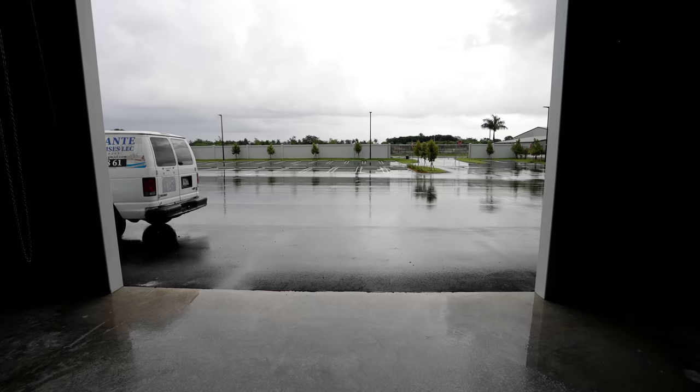Okay, how long will this be in the mold? We have boats in the molds 4 to 6 weeks. Really, why so long? Part of it is that we ensure the curing process. As the guys are hand laying the layers, we want them to dry, we want them to cure properly. Secondly, Kevlar has a longer drying process, so it extends the build time. Our production schedule is limiting how often we can turn the molds, and in turn, it's limiting how many boats we can build annually, which is fine with us. We're not trying to mass produce boats. We're trying to build the strongest boat on the water. This is how we do it.